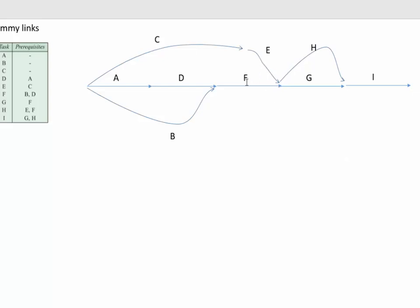E and F both go into H, and that's right, they both do come in here. But they're also both coming into G, and G only has F as a prerequisite, it doesn't have E as a prerequisite.